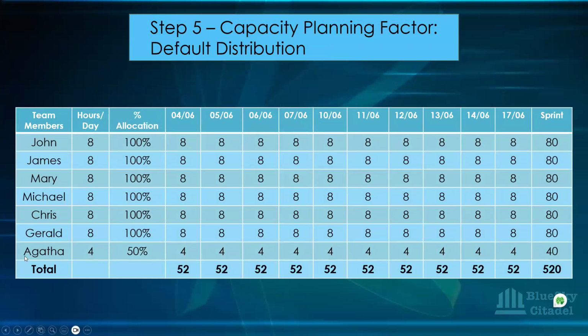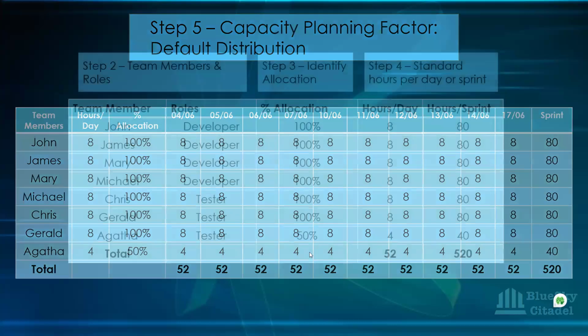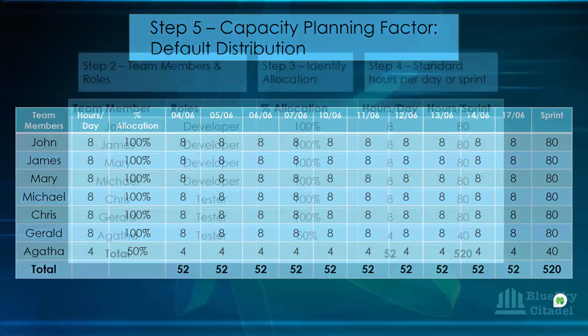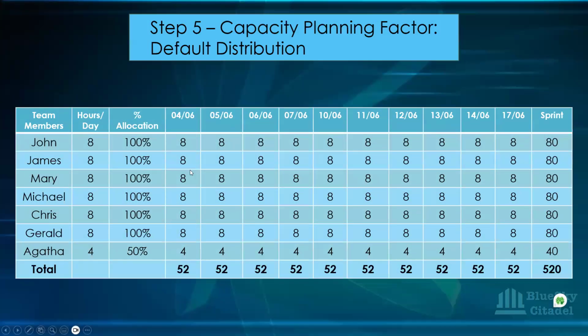Okay, and this is just me writing it out, expanding what you have here, expanding it out in days over here. So remember the calendar we have, just putting things in the calendar. So 8 hours here, 8 hours here. We're still coming to the total of 52. You'll have 52 here, 10 days, 10 times 52 gives us 520. That's what we're just using this to analyze.